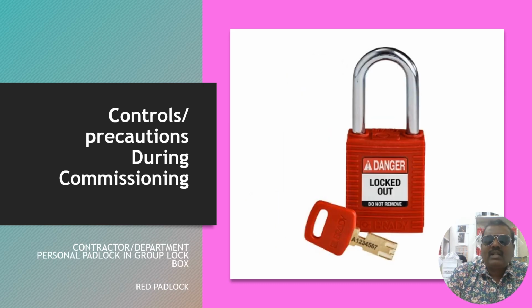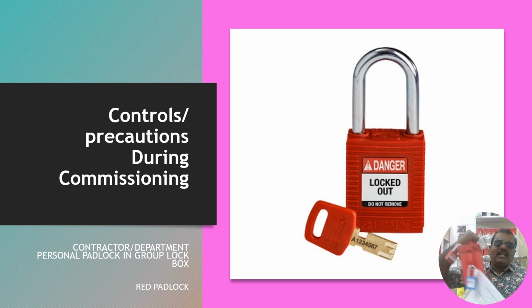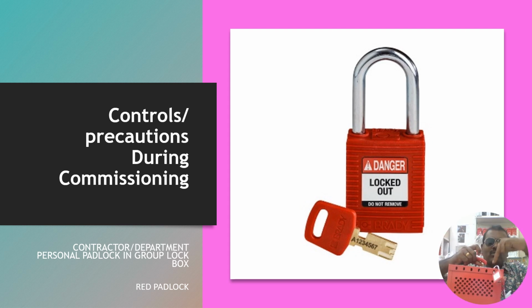What is this red color with no tags? Once we have completed the lock on the site according to the PTW LOTO, those keys we carry to the office and place inside this box. This is called a satellite box or lockout box.